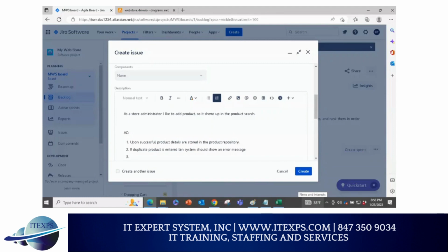Because if you enter the same thing, then the system should. Right? So these are a couple of exception criteria. Again, you can evolve these criteria anytime. There will be a question in your exam. If your acceptance criteria change, so your estimation will change, yes or no? If your acceptance criteria change, will your effort estimation change or not? If I go to a restaurant and I say, hey, I need food. The guy says, what do you need? Let's say I say, I need a sandwich. And after that, can you give me soup also? So suddenly your acceptance criteria change. So then effort will also change.